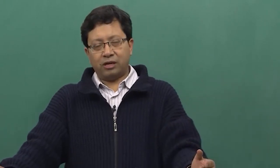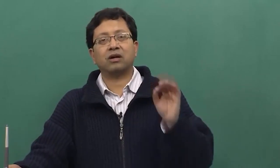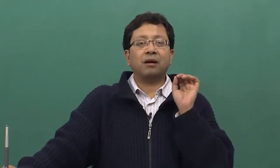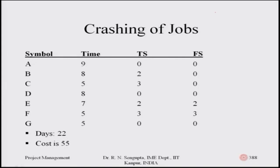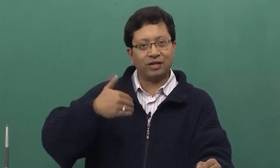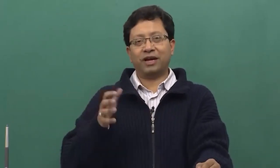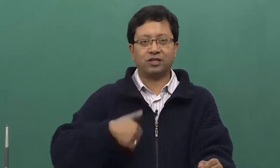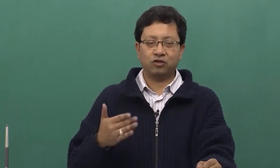The relationship between total slack and free slack is known to us. Based on the rule that critical path activities have zero total slack and zero free slack, we can identify the critical path. I will not jump immediately to naming the path, but first concentrate on the total number of days and the overall cost. The total number of days is twenty-two.